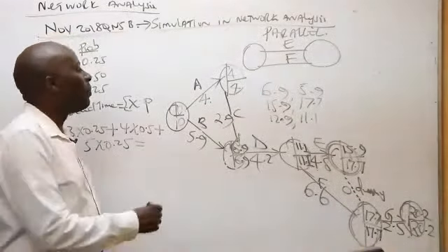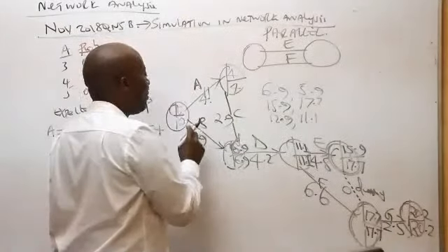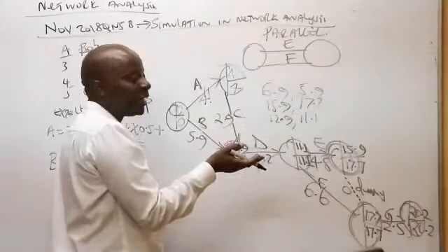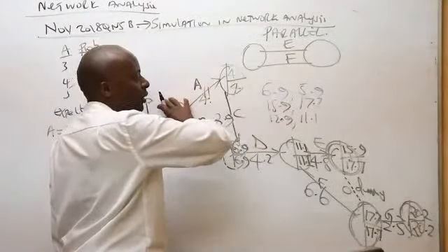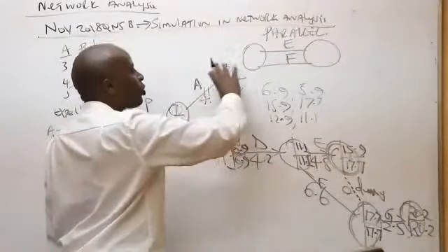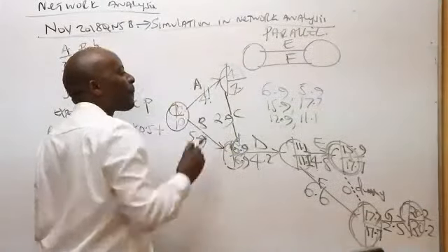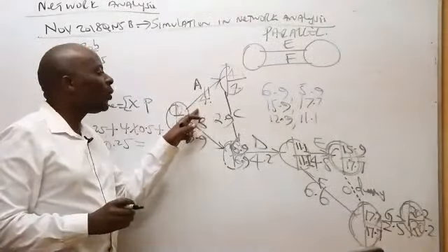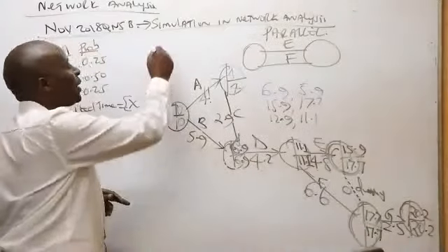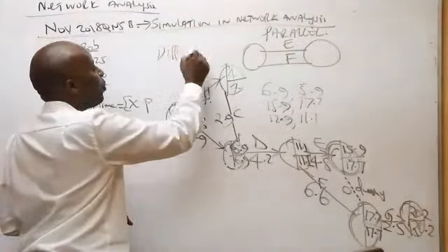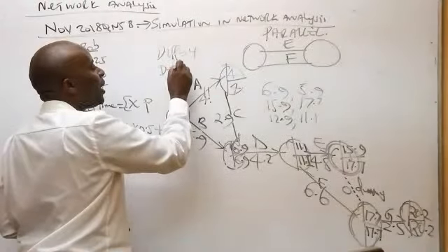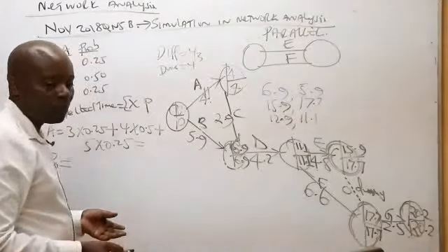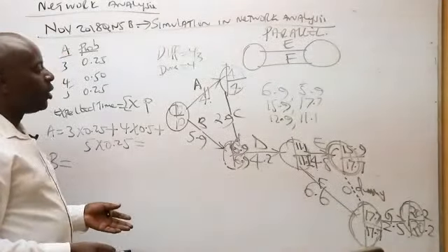Walter is telling me, Mwalimu, mark A. When you ask him why A, because of the similarity. So 0, 0, we have 4, 4. And then when you take the head minus the tail, the head is 4, the tail is 0. So 4 minus 0, we are getting exactly 4. And this exactly 4 is identical to A's duration. So the head and tail difference is 4, and the duration of A is 4. They coincide, so it means that A must be critical. Confirmed.